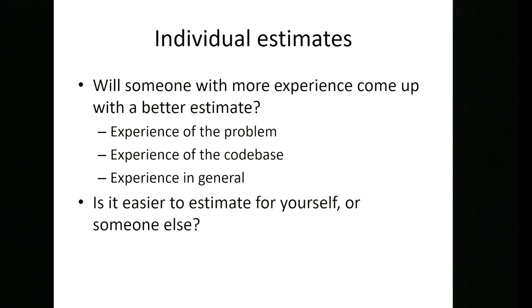Another question to ask is whether it's easier to estimate for yourself or for someone else. One might perceive it is easier to estimate for yourself, because you have experience yourself of trying to code and so forth. Project managers obviously spend quite a long time trying to estimate for other people, and the way they do that, interestingly, is take the estimates that their developers give them back and multiply them by something, sometimes increase them by an order of magnitude, I've heard as well. So at least increase them by a factor of 4 or something.